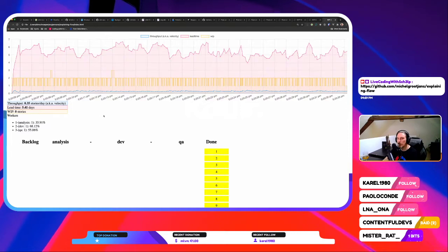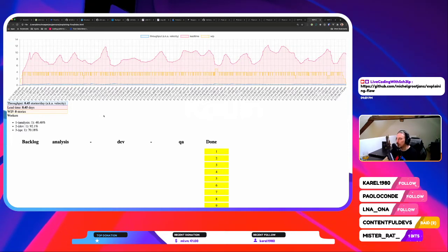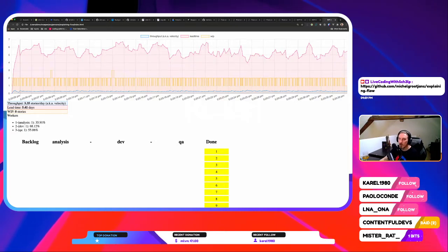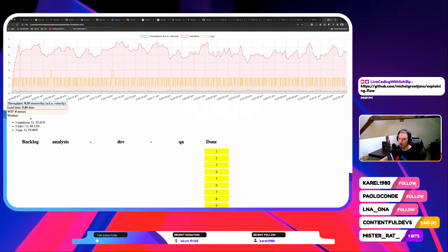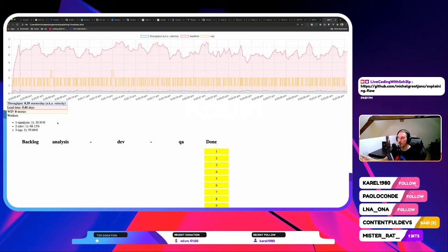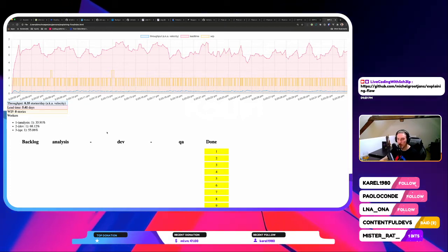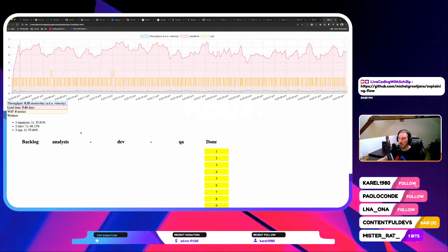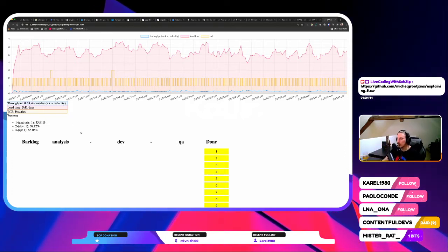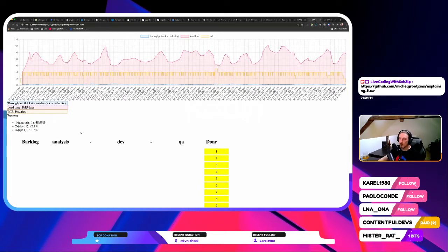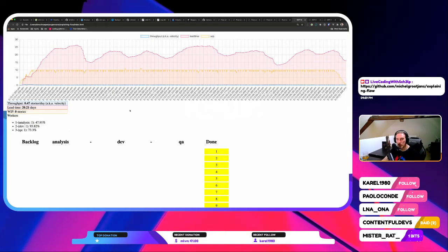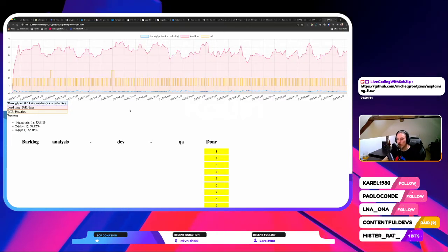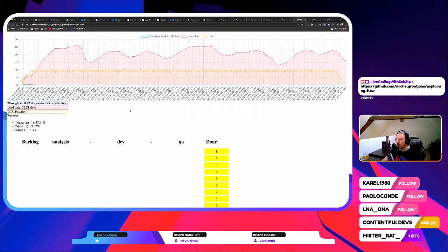So that has in fact decreased, sorry, but it decreased with this as a result. So the throughput here is now a bit more drastic, let's say. So it will take a shorter time to learn about one thing, but the throughput, if you have deadlines, then this might be a more serious problem. Whereas if you look at this here, the decrease from 10 to 4 was only 0.02 stories per day slower, let's say. But here we're decreasing with 0.10, so maybe that's more considerable.